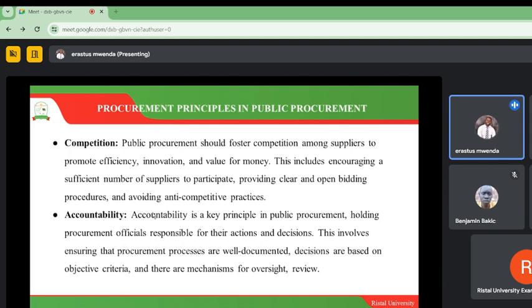Reason because they have been, for example, bribed or they are asking for a kickback for them to be able to award a certain contract to a particular individual. So to be able to avoid issues around that, all documents must be present. In case even the unqualified bidders, the ones that we were saying we need to debrief, in case anyone goes to court, then with our well documented process and series of steps that we have followed, we can use that to defend ourselves against anyone who has brought that issue.